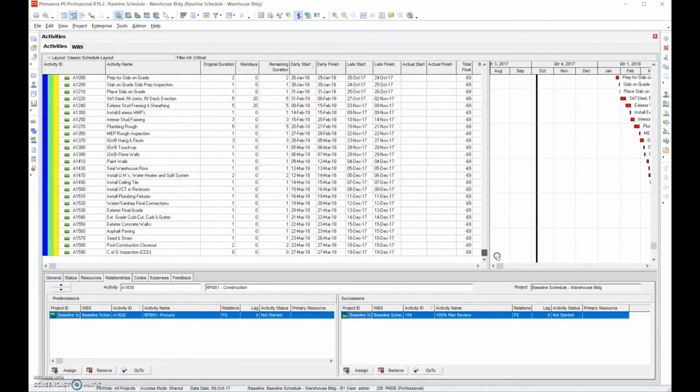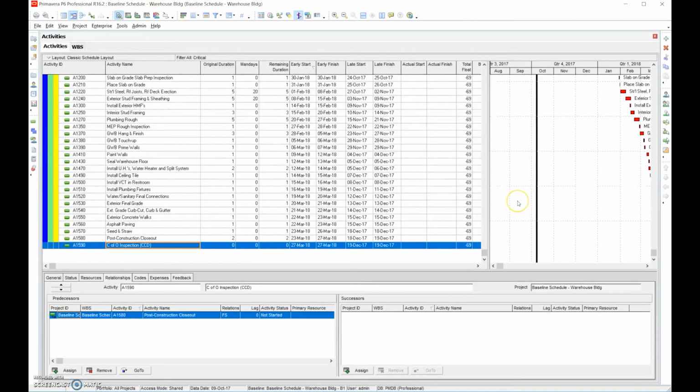And we go down to the bottom and we look at, okay, what is the CCD? And if you remember when we talked before, we had a negative 27 days, meaning that's what we were entitled to. Okay, we were entitled to 27 days of time. So now it's saying that we have negative 69 days.